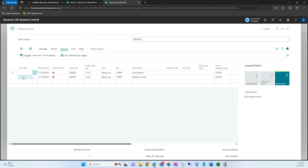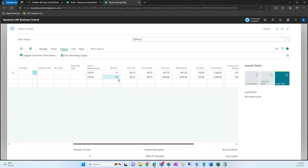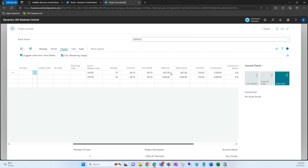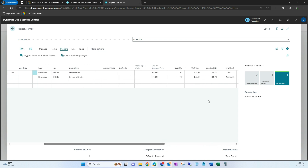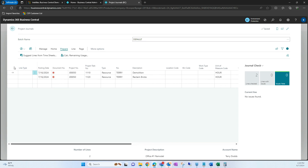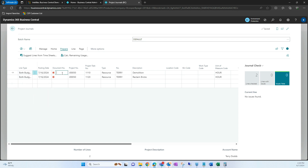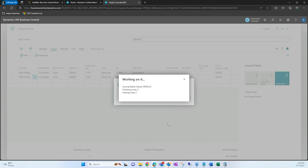Those lines were populated for us based off of the timesheet Terry had posted — we have the project, the project task number, and the hours spent. We can also adjust the unit cost and total cost. Under Line Type, we can specify whether it's budget, billable, or both budget and billable — I'm going to select both. Then I'll give these lines a document number, and from here I can go ahead and post these lines, confirming yes and OK.